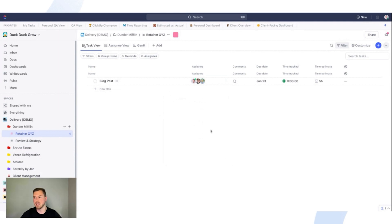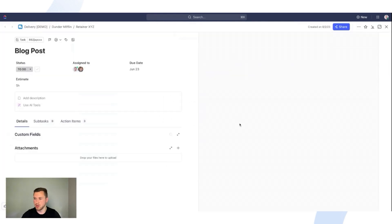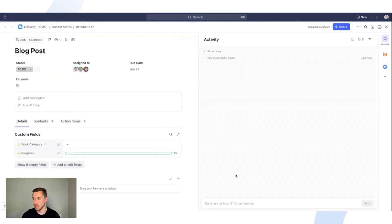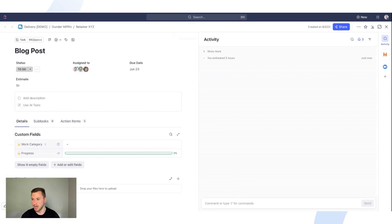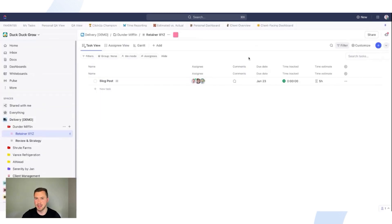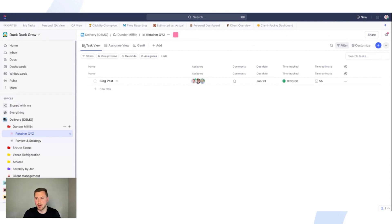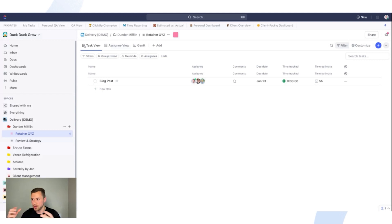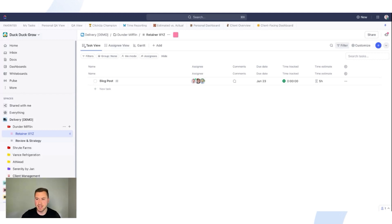So oftentimes people will start there. They have one task with a checklist and then they're just communicating and saying, Ian, can you start writing this? This is due. I'll review it, yada, yada. And they comment on this task and things just get lost. No one knows when writing the post is due. No one knows when sending it to Michael is due and actually publishing it. It's all just one due date, multiple assignees with a checklist in that parent task. That's really the first phase.